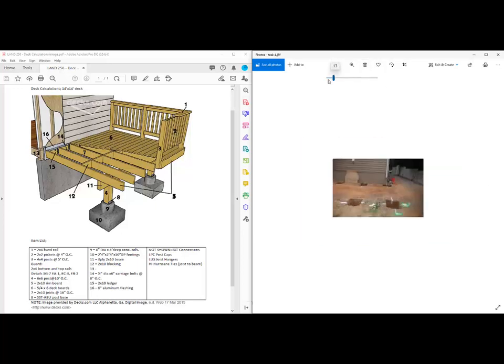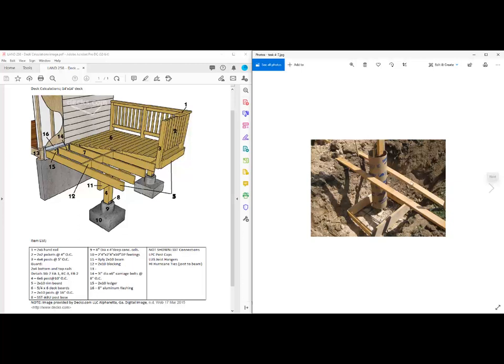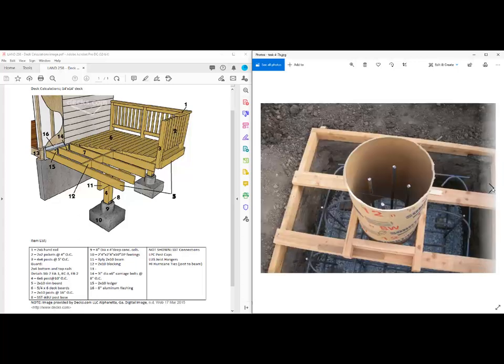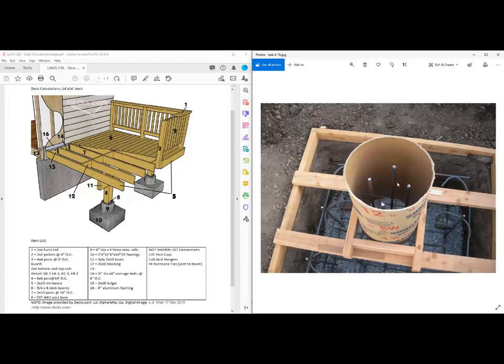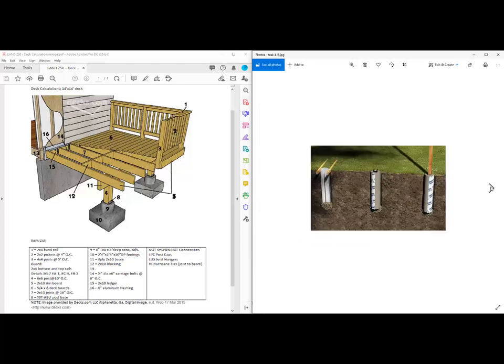Once the holes are actually dug, I have to bring this back to its original size, we can start putting in some formwork. This is showing you a number of tasks going on at the same time. The formwork we have here is task number five. It can be done and poured individually and then the sonotube placed on top, in which case we'd have rebars over it. They've chosen in this example to do everything at once, and it's very difficult because you have to make sure things are centered vertically, perfect, placed in the right location, and then pour everything at once. The formwork has to be in place before you actually pour the footing. Therefore, the formwork is task number five.